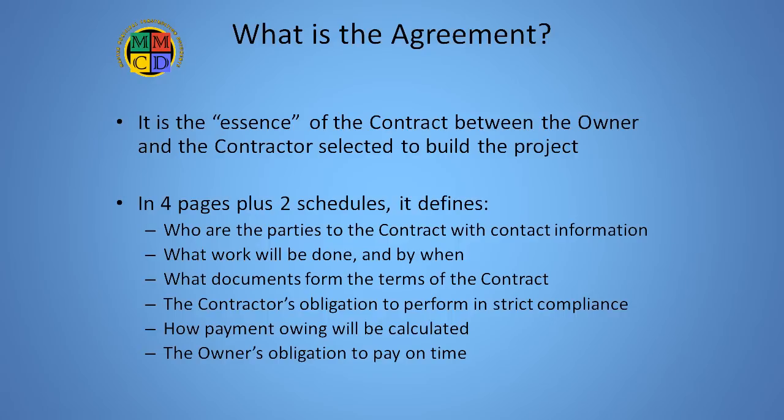It then goes further to enable the parties to create additional contract documents by following the authorizations and processes an existing contract document creates. It also sets out how the amount the contractor is due to be paid will be calculated at any point. In return for the contractor committing to construct the work in strict compliance with all provisions of the contract documents, it commits the owner to pay in full and on time.